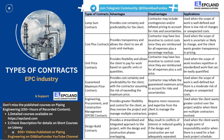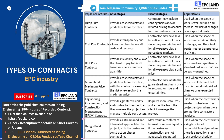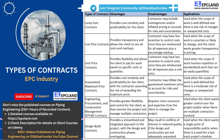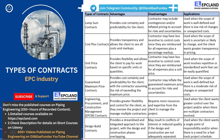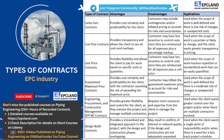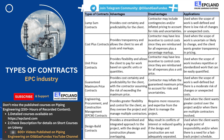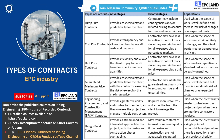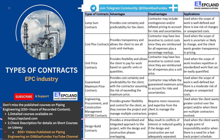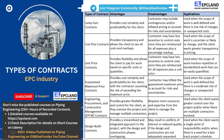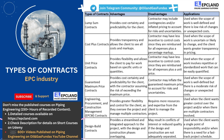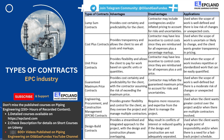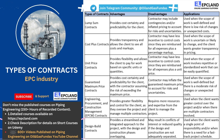Cost plus contracts are another type of contract commonly used in the engineering, procurement, and construction industry. They are typically used when the scope of work is uncertain or likely to change and the client wants greater transparency in pricing. One of the main advantages of a cost plus contract is that it provides transparency and allows the client to see all costs and markups. With a cost plus contract, the client is responsible for reimbursing the contractor for all expenses, including labor, materials, and overhead costs, plus a percentage markup. This can provide greater transparency in pricing and help the client to better understand the costs associated with the project.